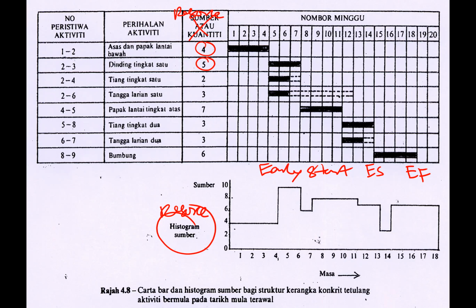that you attach to. Let's say laborer. For a small project, normally laborer or workers will be everybody. He is the one that can be considered as carpenter, then bar bender, concreter, bricklayer, everything. So normally in a small project, the same people will be used again and again. We do not split them into trade because that is how a small project will basically go through.